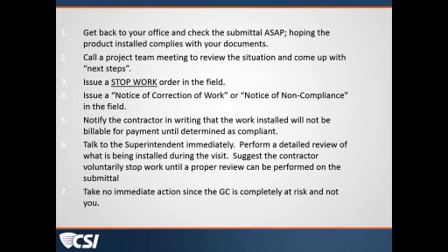This may be, as we've talked about before, trying to work with respect. This may be because there are some potential discounts that might be obtained if orders are placed early, and subcontractor agreements require those orders to be placed with certain documents submitted, and so those submittals or shop drawings might be a part of that agreement. Of course, we can say that's not our problem, that's yours. But if we take the approach that, well, let's find a way to work through this,